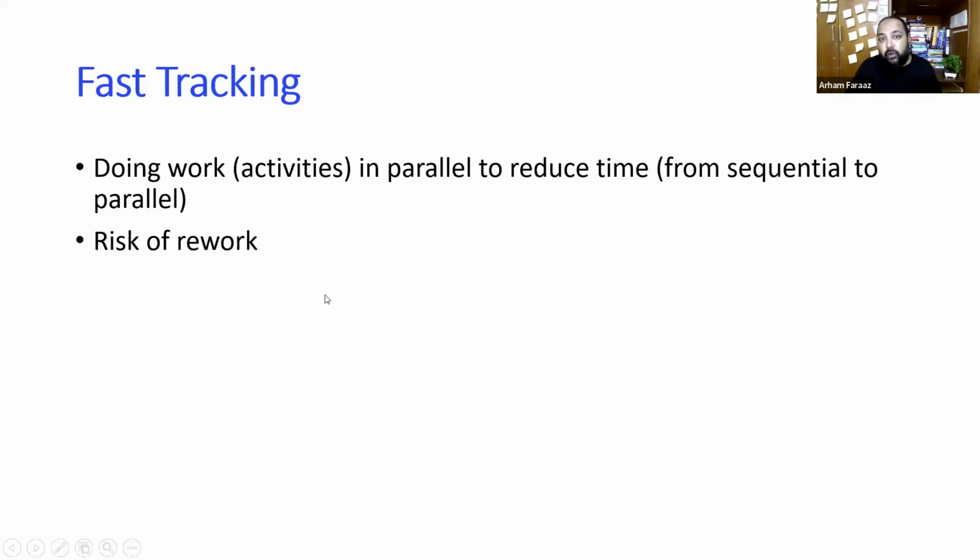Then there is a risk of rework because something is still not complete and you started off the work for that. For example, design is still not completed and you started off the development just to save some time. There could be some change in design that could cause some rework. Getting that? So there is a risk of rework. Remember this important core concept of the PMP examination.